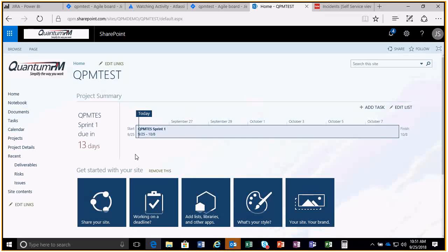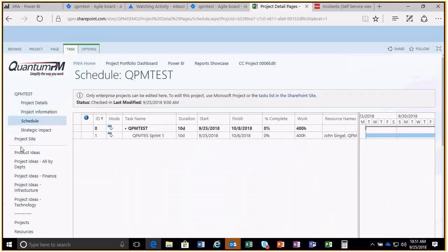If I go to Microsoft Project Online Project Center, this is the highest-level view of my projects. I created a project type called Scrum Project, and if you go to it — QPM Test, that was the one we created within JIRA. If I go into this project, you'll see Sprint 1 is 10 days, starts the 25th, and these are the resource names. I don't need to know what the backlog looks like or what's pending for Sprints 2, 3, and 4. I just need to know what's in progress and who's assigned. You can change the level of integration and business rules as you evolve.